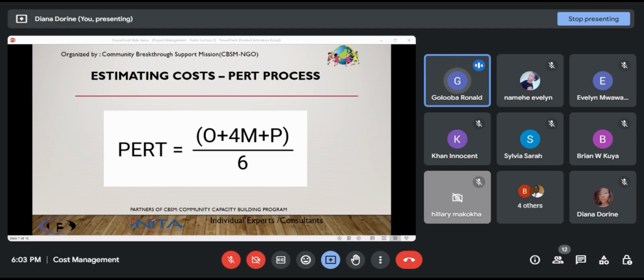For example, if you're planning on implementing a community-based initiative, and you're going to conduct outreaches, and you have a target, for example, you're supposed to conduct, say, 2,000 community outreaches nationwide. And your best case scenario here would be that we can conduct a quarter of those outreaches within the first quarter. So the duration there, in a quarter we have around 12 weeks. That would be the best case scenario.